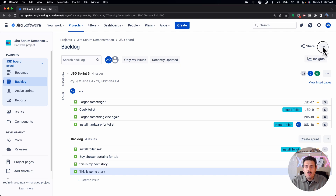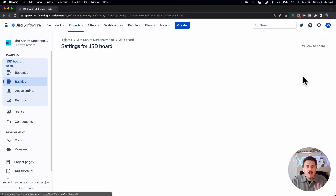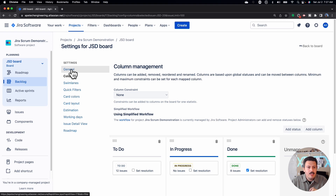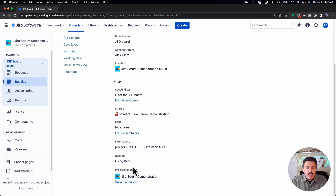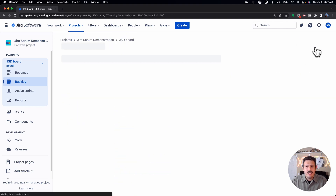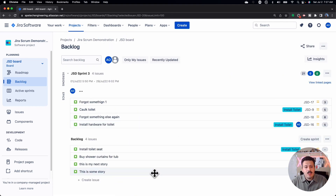If it's not ranked, you want to talk to your Jira administrator and your board owner. There's a section under general that will basically tell you if you're using rank or not. By default it should be using rank, and this is going to be very key because the rank as a product owner is your biggest tool here.